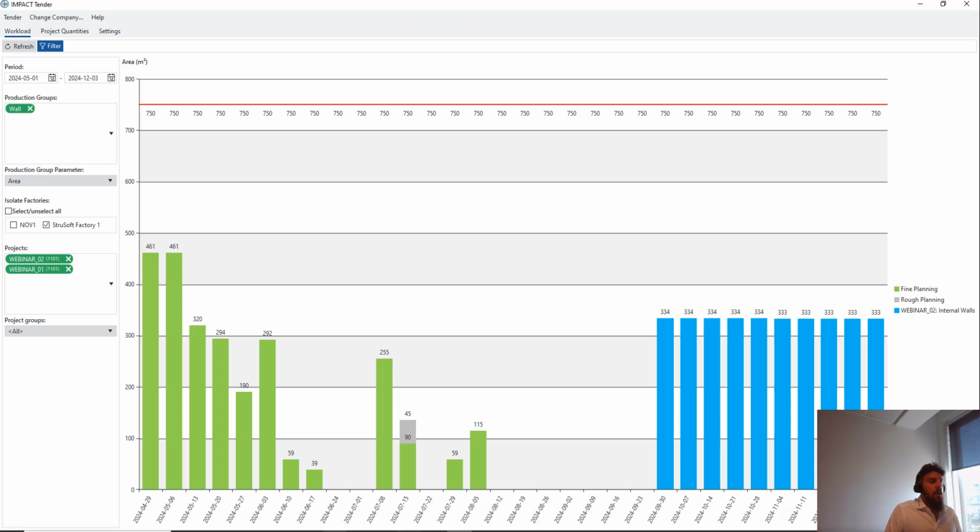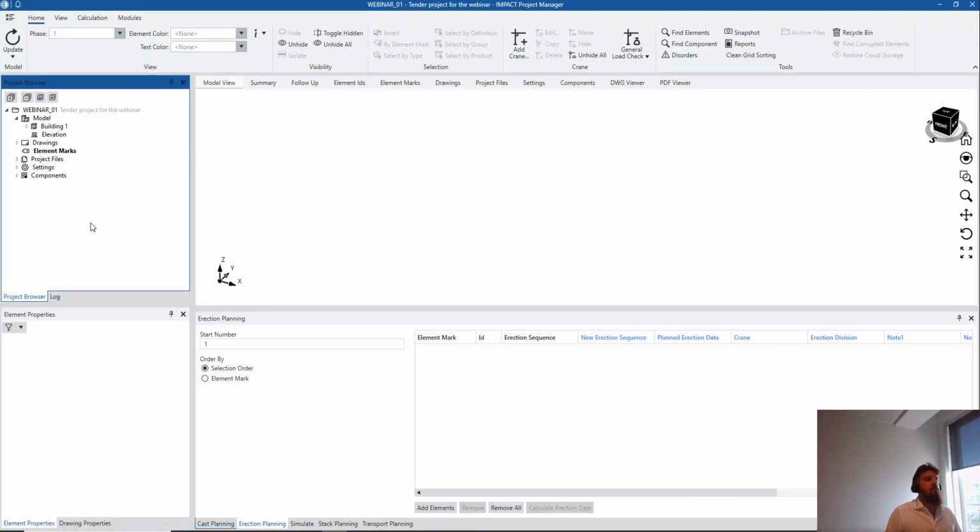Yes, in theory you can, but the whole point is when you can actually design when it is a pre-phase project, that's fine. But when you actually start putting planning dates into the project, that's the point where you have to change into a production project. Otherwise, it will not count against your capacity.